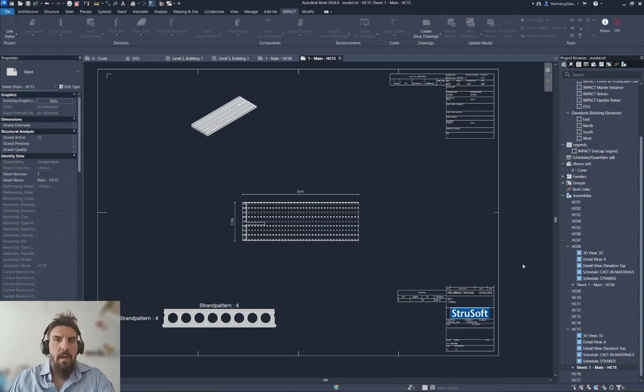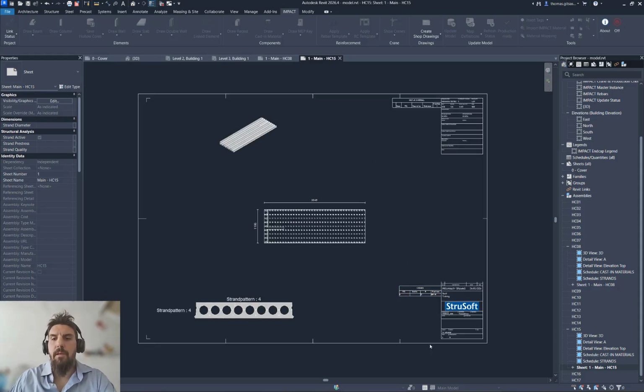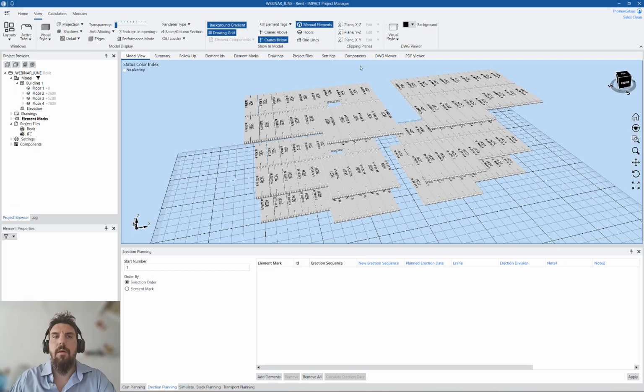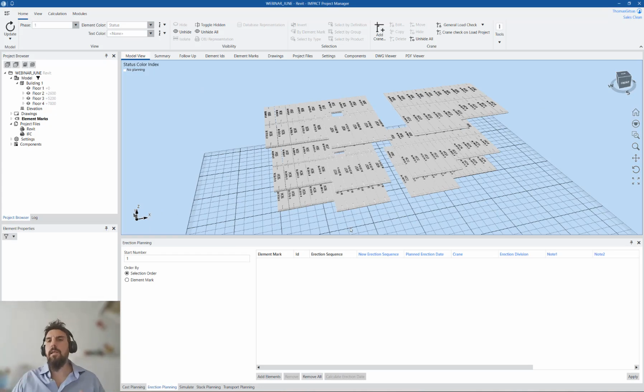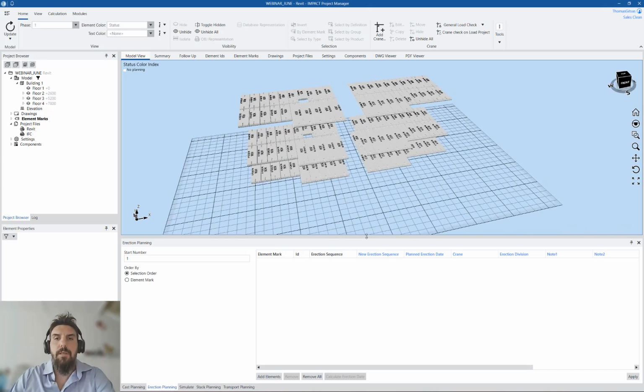Having a subdrawing, approving the subdrawing, and setting the status of the subdrawing to approved, then we go back to our Impact, and then we can have what we call either a rough model, an initial model before everything is approved, so we can use this information for planning, or we can also have approved elements, which means that now they are ready for production, and that will apply to the status of the element in our case.